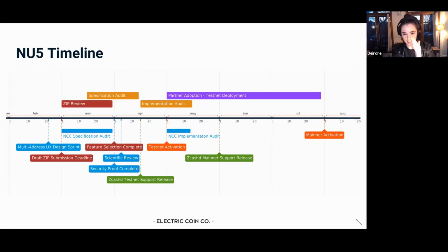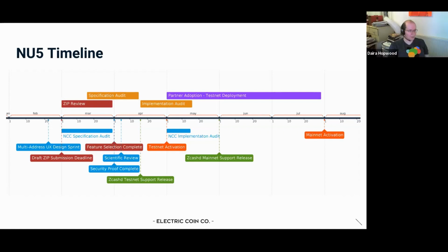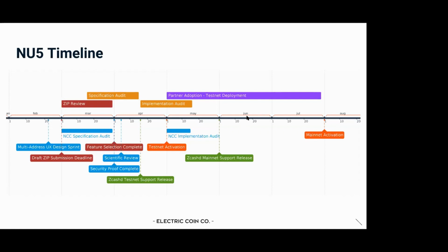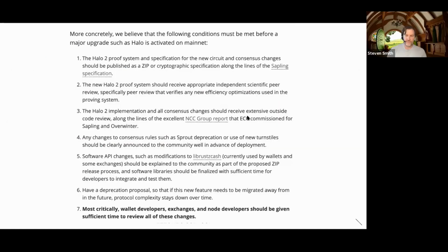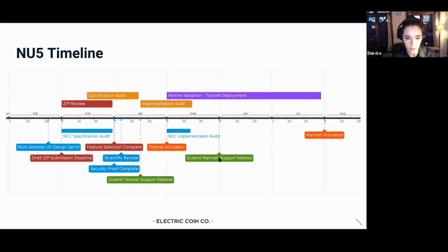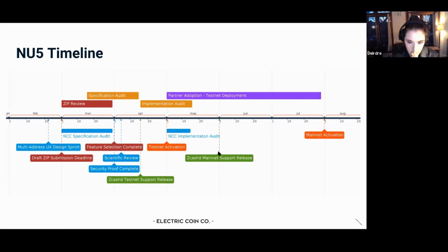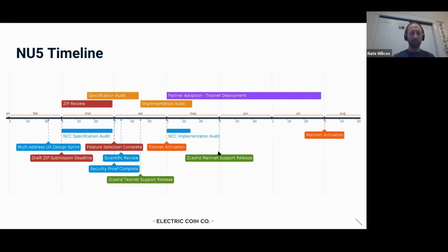I'm trying to make an analogy to a literal rocket launch. What we could do is delay the mainnet support release, say, to mid-June. And then we have a hard requirement that it's like a 2-month thing. That's an example. Yes, that sounds about what I'm trying to get at. So if we find a bug after that, then we treat it as a security bug. That's the cutoff point, and that's not fun.